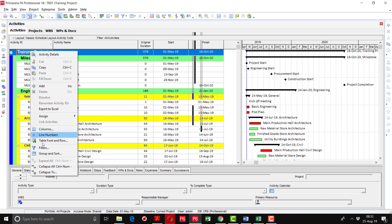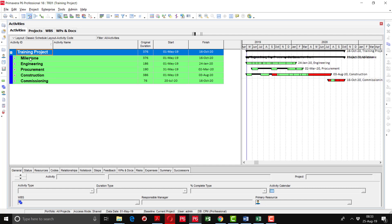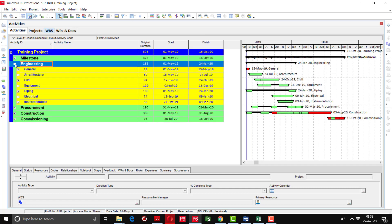If you want to see the summarized timeline, right-click and collapse all. At level one you can see the project timeline of 376 days. At the next level you can see the timelines of all WBSs: Engineering will be completed in 186 days, Procurement in 190 days, Construction in 376 days, with a summarized Gantt chart on the right side. Going into the engineering detail, you can see architecture, civil, equipment — every WBS has a timeline.